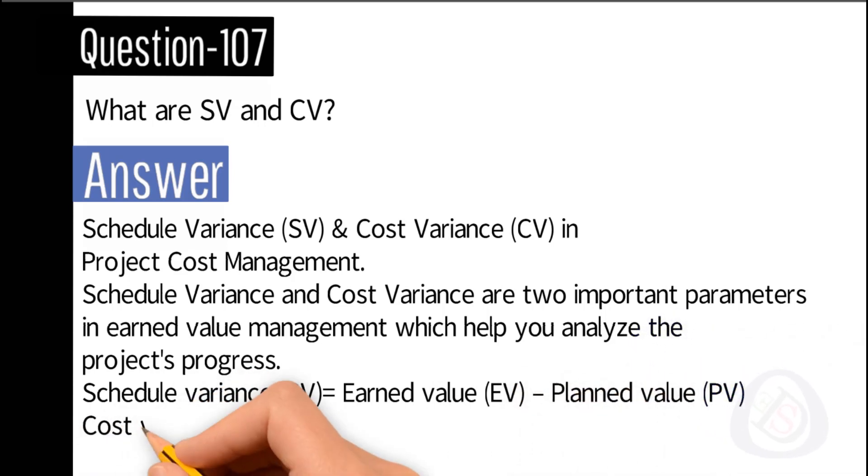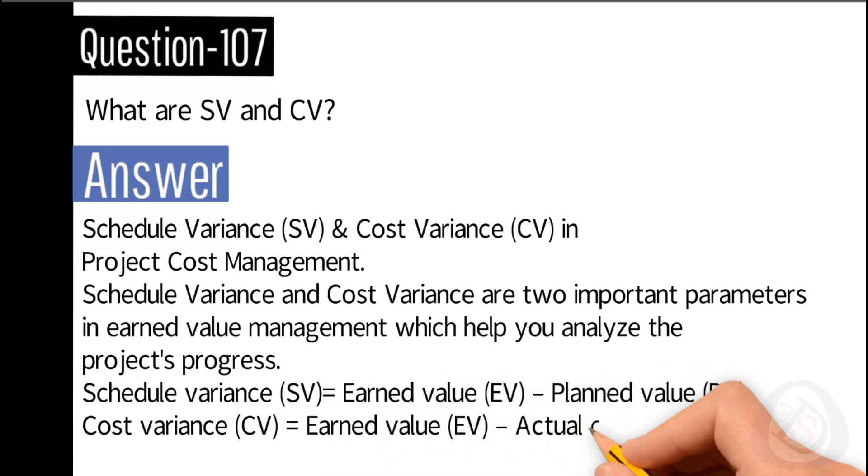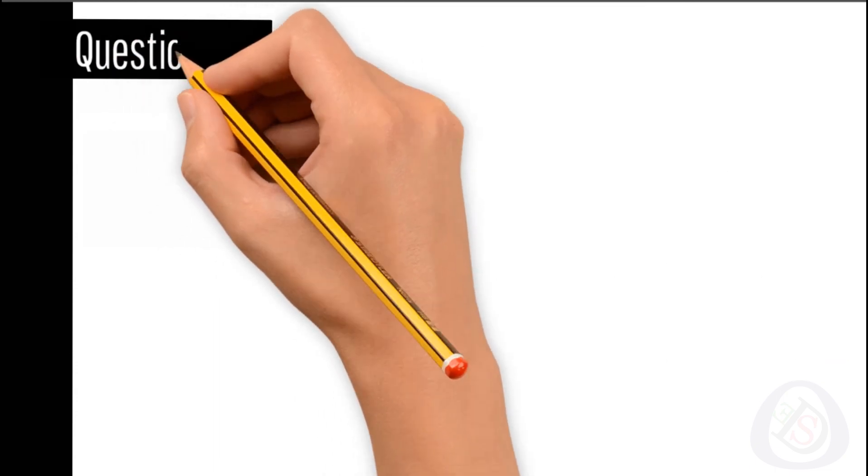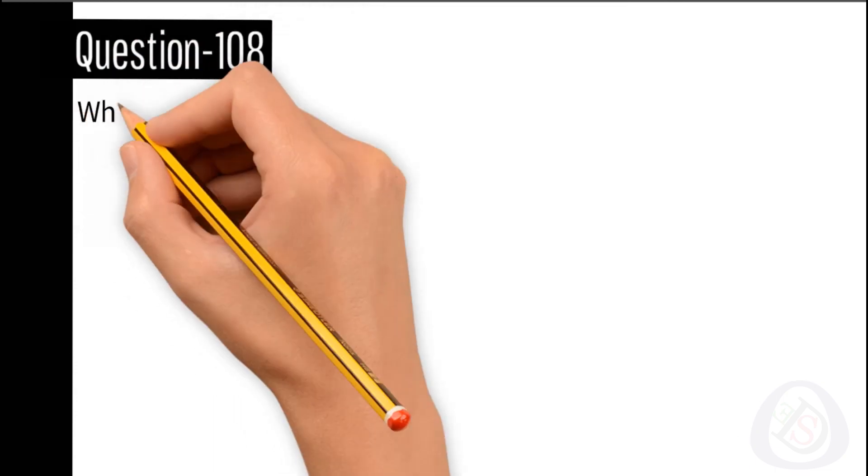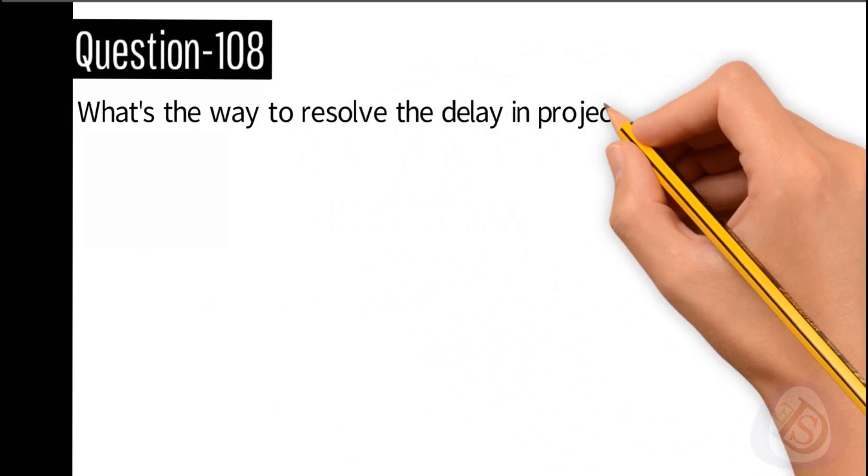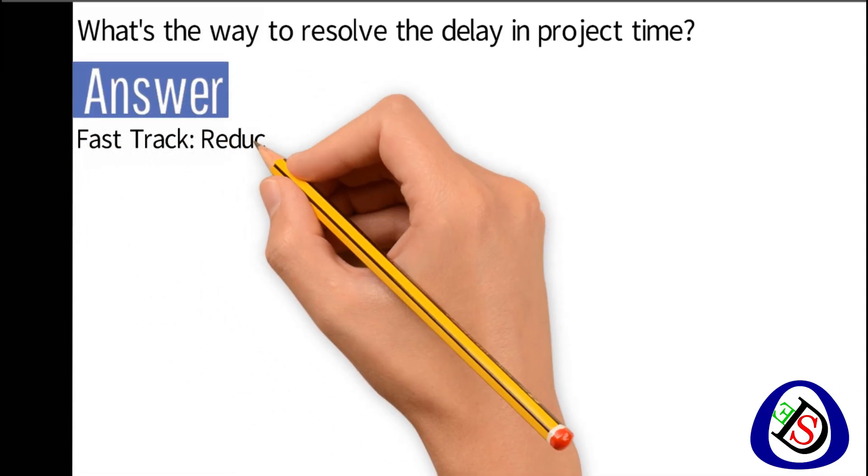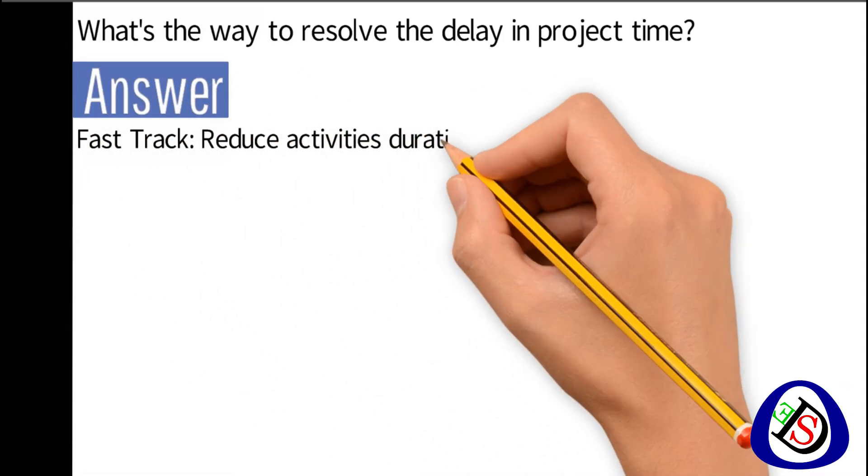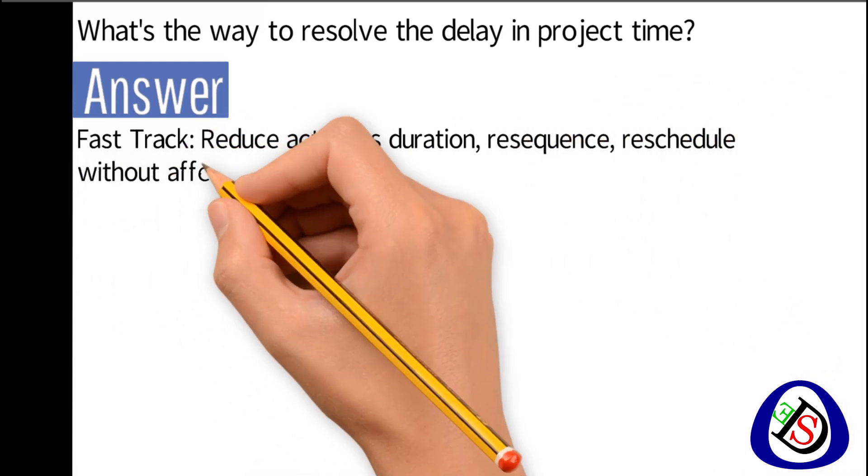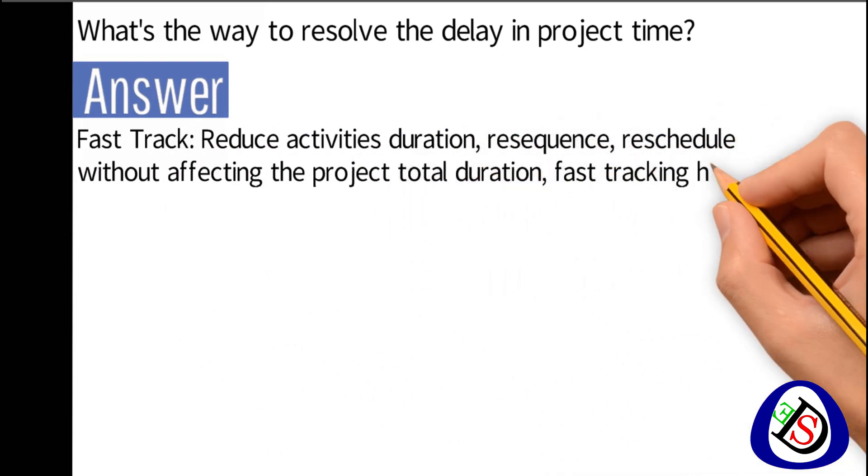Question number 108: What's the way to resolve the delay in project time? Answer: One, fast track - reduce activities duration, re-sequence, reschedule without affecting the project total duration. Fast tracking has a problem regarding quality issues if it is applied in the wrong way.